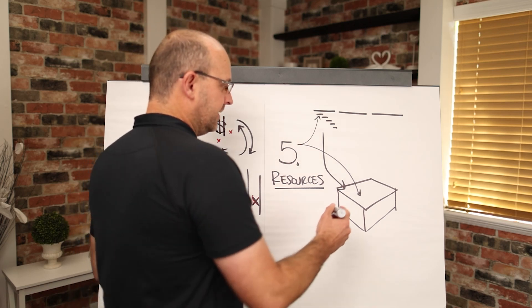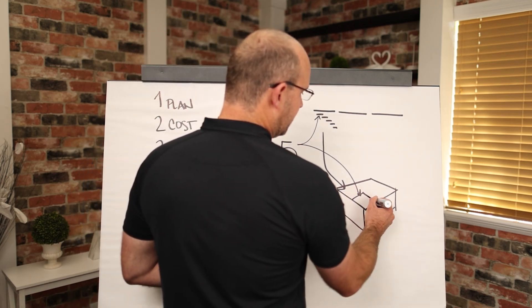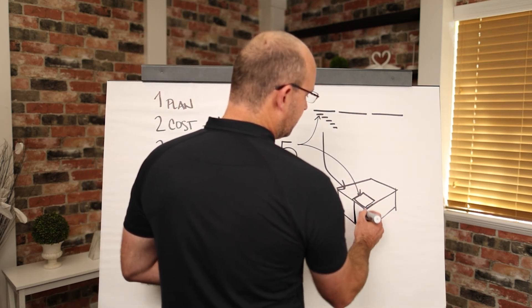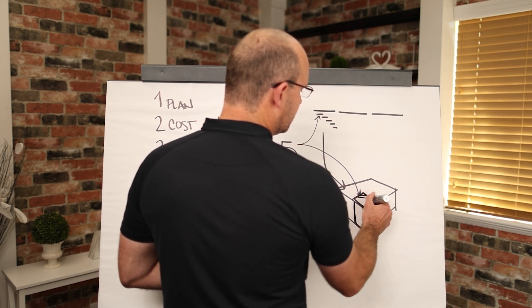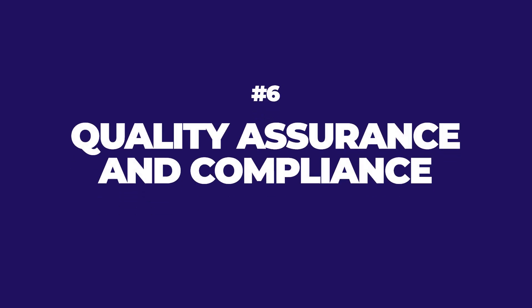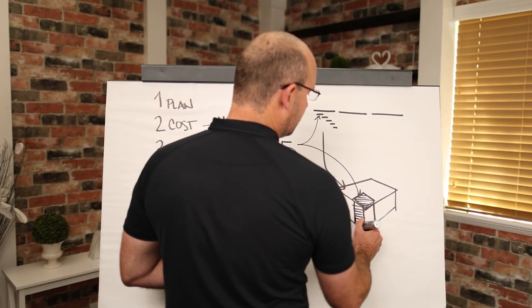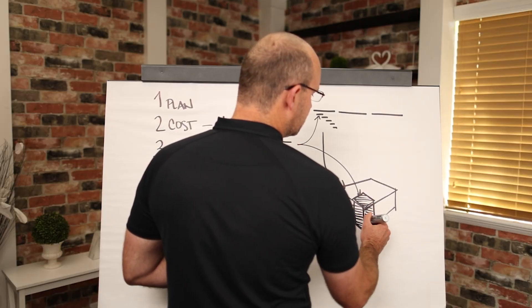Six, when it's being built and you have the resources coming in, you'll want to break this building into components either by scope or by area and you will want to QC that work as it goes in from a quality assurance standpoint and make sure that you finish as you go.